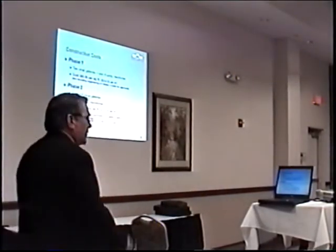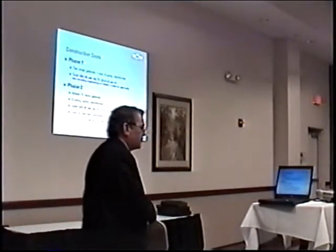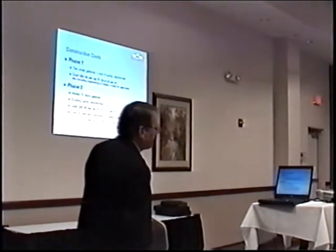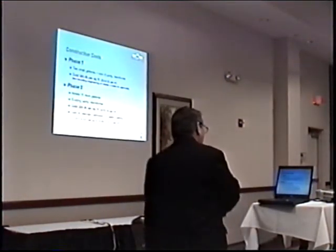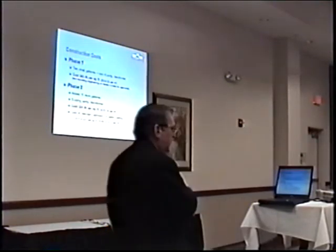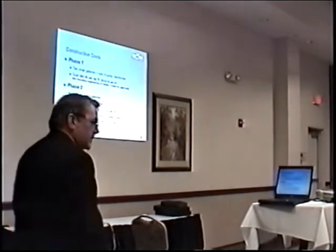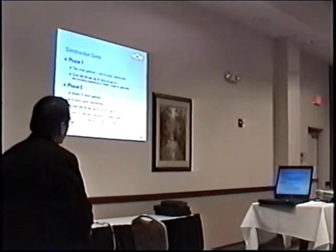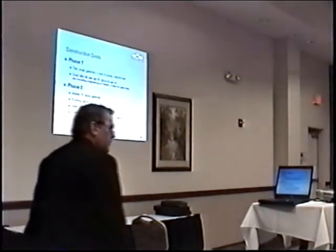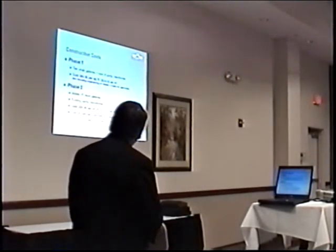Cost. This was the first major water mist system in North America. A learning curve for the sprinkler contractors, and even for the vendor, Marioff, the Finnish company, had never done anything on this scale before. And none of them had ever done anything with me in the background watching every move they made. So the cost of that was about $50 a square foot for the areas protected. Very small galleries, huge cost for the pump and the infrastructure. By the time we added phase 2, and you now blend the whole thing into basically 12 galleries, many, many kilometers more of tubing and pipe, now cost comes down to about $30 a square foot.